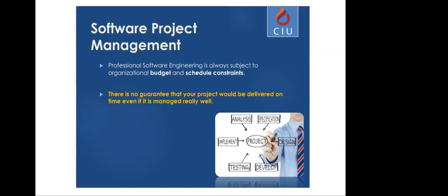It is not possible to measure software, or it is not possible to see 100% development because it is not something physical. Most of the engineers would work on something physical that you can actually see and touch the progress itself, such as buildings, machines, electronic devices, and so forth. However, in our field, this is more difficult because what you see is basically a user interface. And especially if you are developing something at the background, it is much more difficult to prove that the project is progressing.